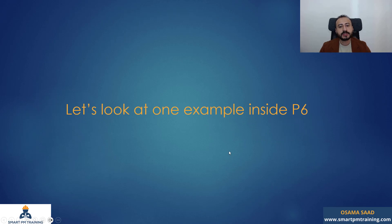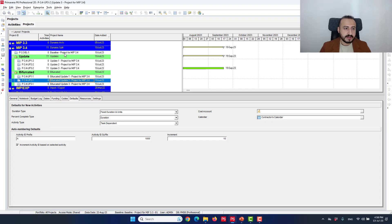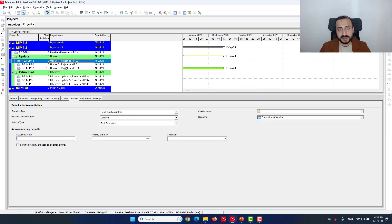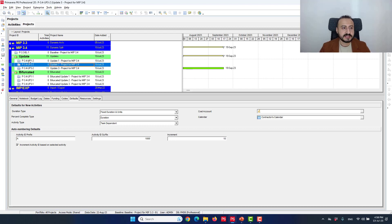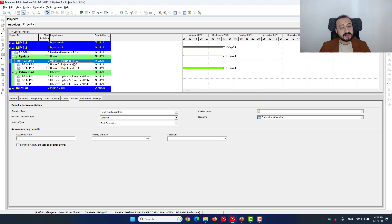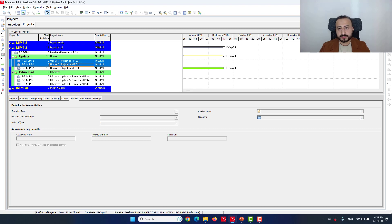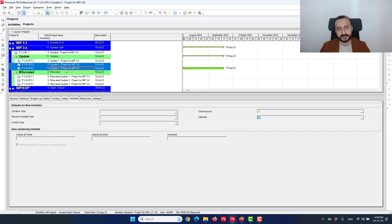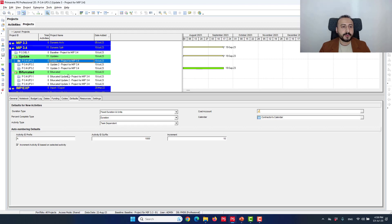So let's look at one example inside Primavera P6. I have my baseline and these are the schedule updates — the update itself that was submitted to the engineer or consultant. In the 3.3, we compare update one to update two, or update two to update three. In the 3.4, we're going to bifurcate the schedule update using the same process I just explained.